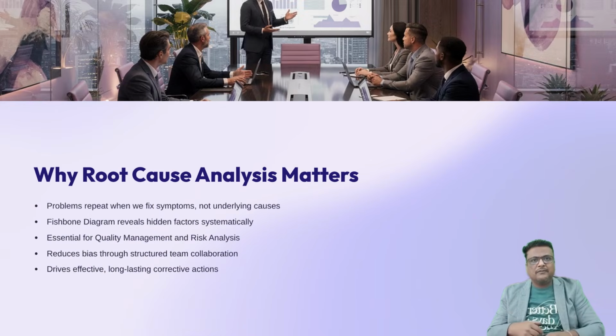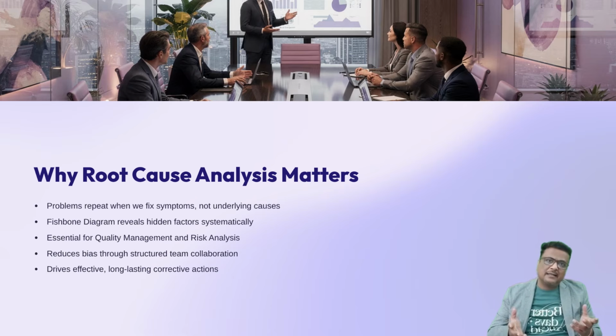We explore how a fishbone diagram is structured by imagining a fish drawn sideways, where the head of the fish represents the problem, the effect that you write clearly and factually. The backbone of the fish represents the long horizontal line along which different cause categories are placed, and these categories are usually standard groups used worldwide for problem solving. In manufacturing or service quality, the categories are often grouped as methods, machines, measurements, materials, manpower, and environment, and this is known as the 6M model.